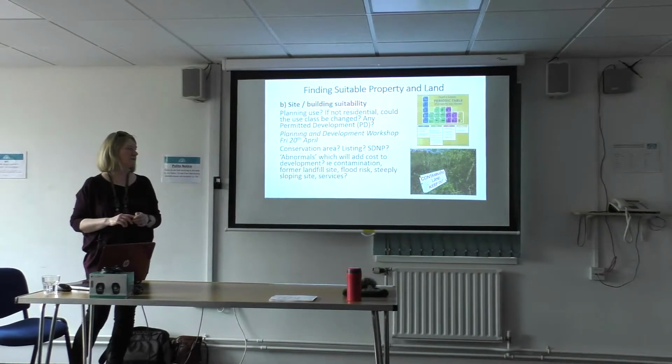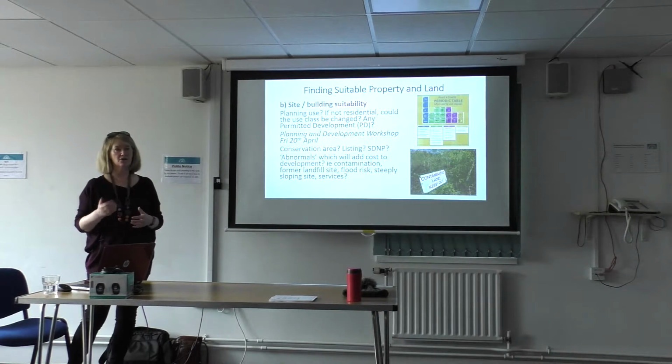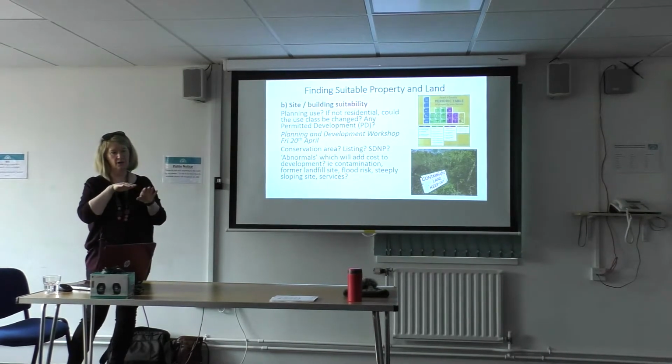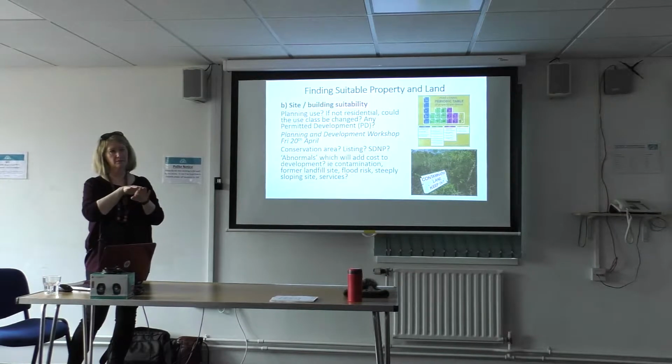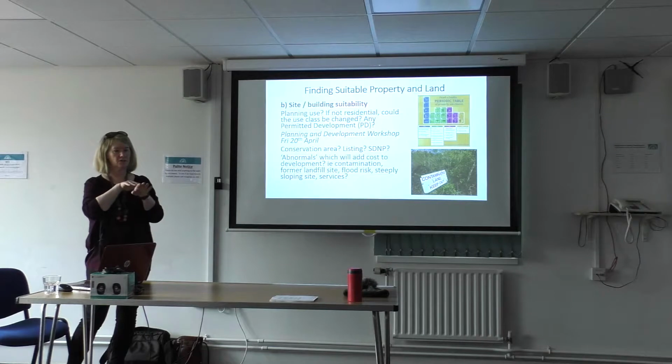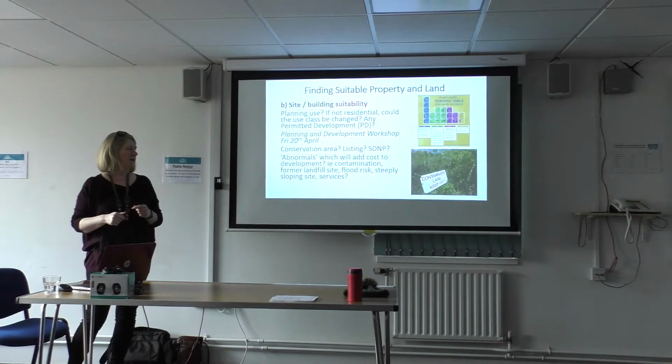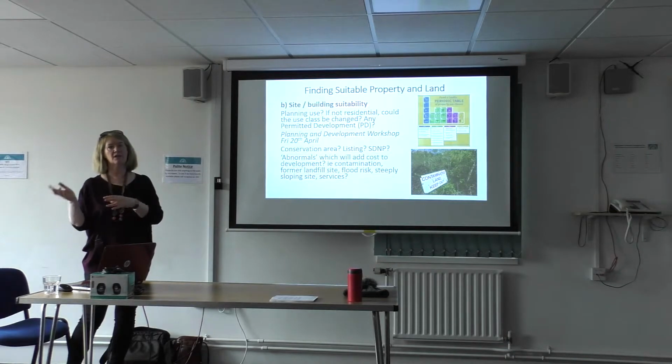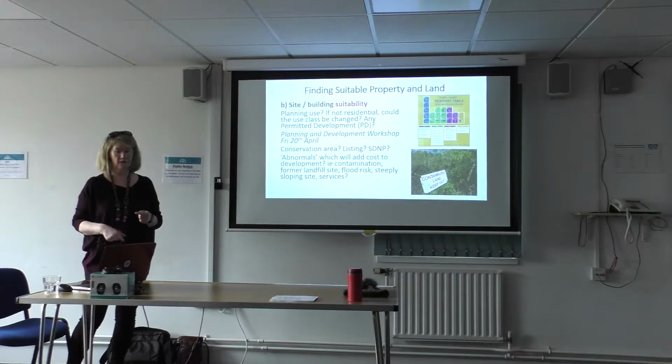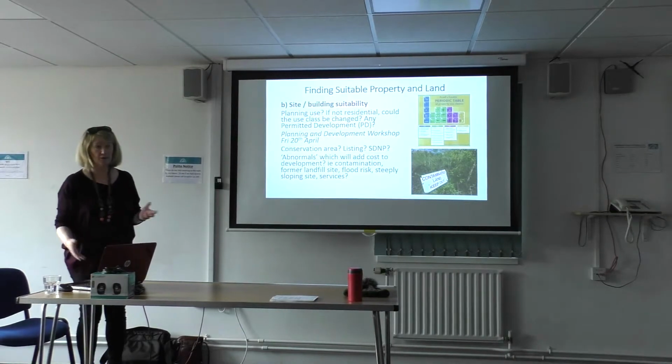Steeply sloping sites, well, again, that's going to add cost because you have to actually make some of the land flat. So there's excavation to be done there. Potentially there's some cutting into the land and filling to do, so it adds cost. And if you take any soil off the site, then that's very expensive. Landfill is very expensive now, which is a good thing.